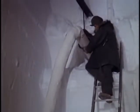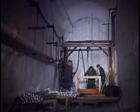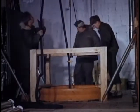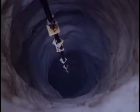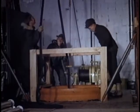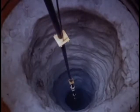Like any modern city, Camp Century required a complex of interconnecting corridors carrying a maze of piping of all sizes and shapes. One of our proudest achievements was our solution of the water problem. A steam hose with a special drilling nozzle was used to melt a hole 3.5 feet in diameter, 120 feet down into the ice cap, until a pool of water formed, which did not drain off. This pool provided 10,000 gallons of fresh water daily.